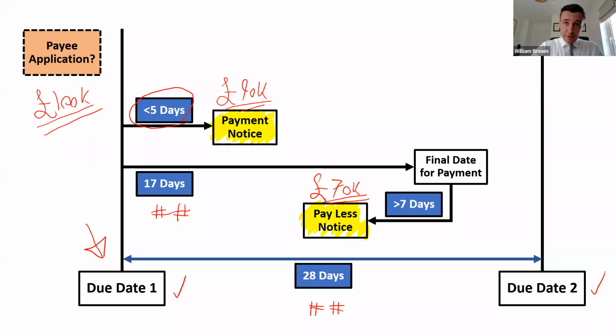Trust me, this looks simple on the screen, but this can get very complicated because these payment terms are not often drafted appropriately. And if you make one little mistake in the drafting, the whole thing can fall down. It becomes extremely difficult to interpret. And the really important thing to bear in mind is this. If you get one of these notices incorrect, if that notice is invalid, then what the contractor originally asked for will become due or could become due by default.